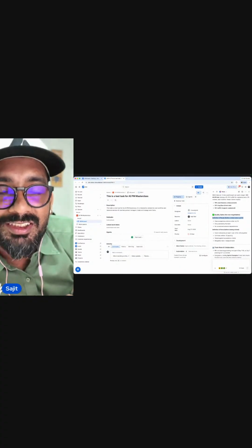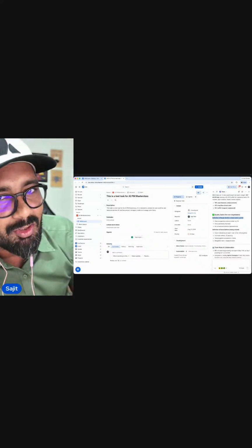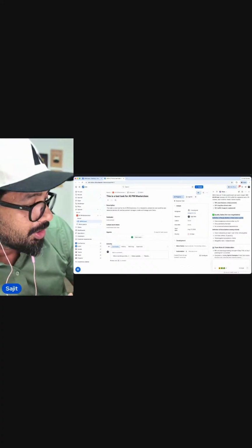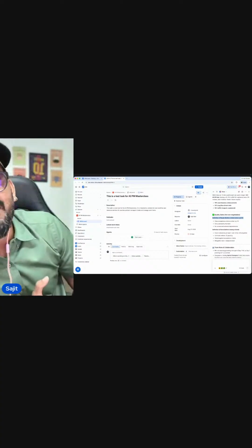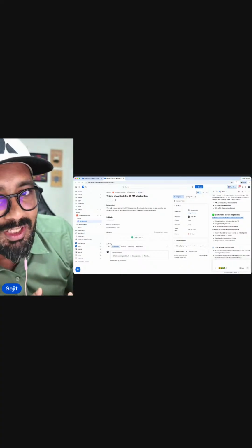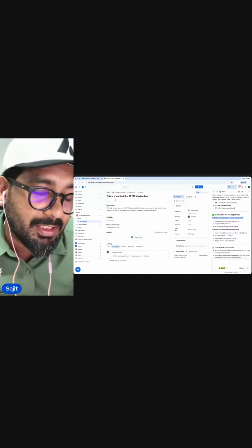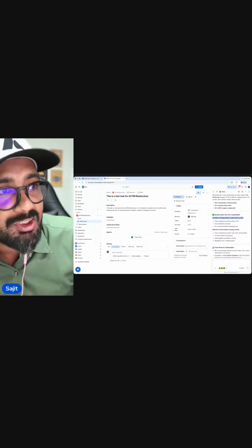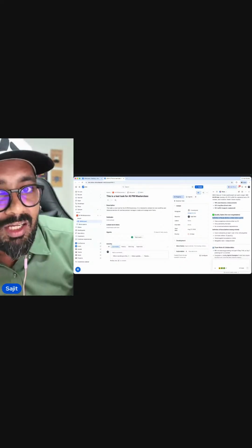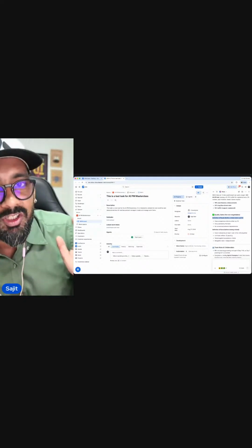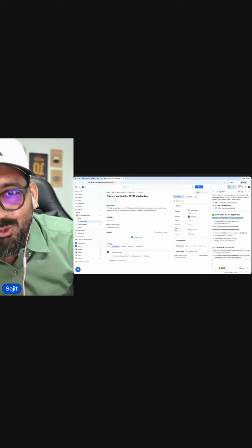If something is picked by a developer and he comes back to you, I'm not clear on what is required from me, or the QA comes back and says, is this what the user wants? You failed at defining your definition of ready and definition of done. It might not be 100% on you to build it. Don't think you need to be technical here, but it's your responsibility to make sure that it's there, right? So definition of ready and definition of done are two things that define whether your ticket will go from the life cycle in a happy manner or in a sad, stuck, lonely manner.